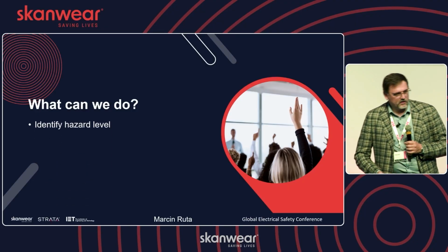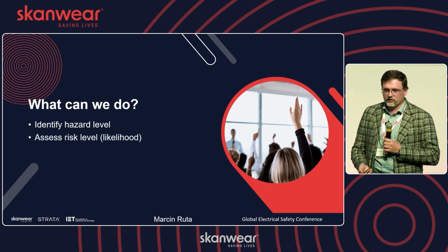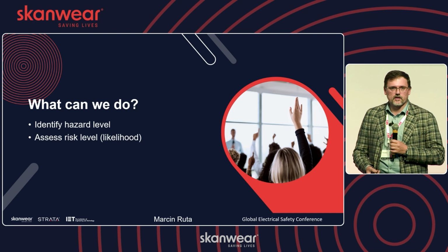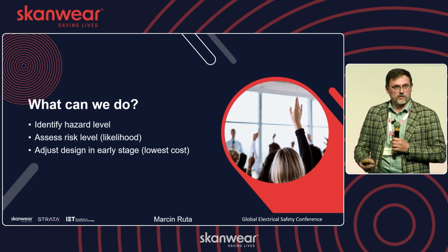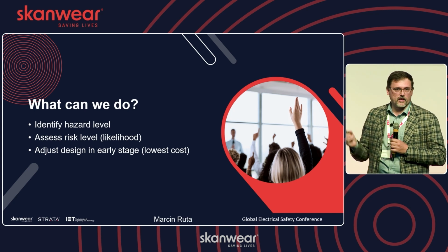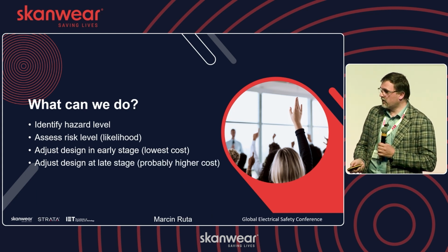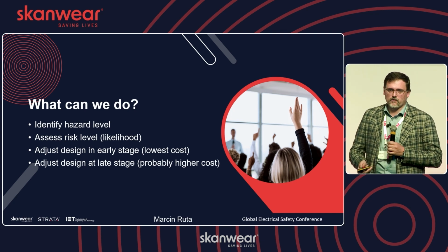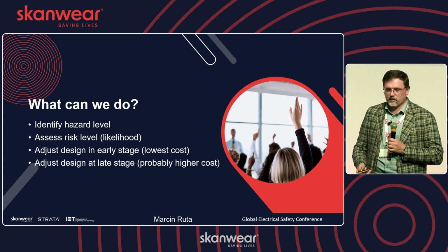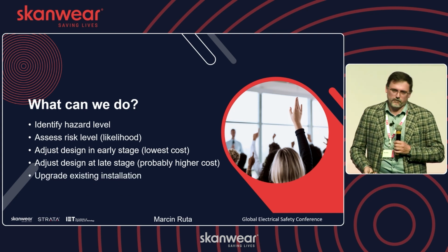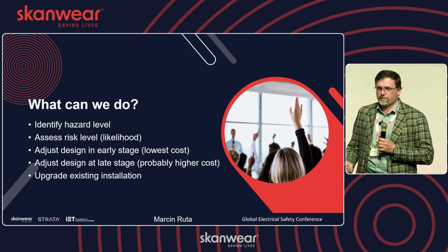We can identify the hazard, so that's the first thing. We can also look at the risk assessment to have a likelihood, so we can assess how likely it is to happen. We can, of course, adjust the design at an early stage, which is probably the cheapest thing you can do if you design anything. We can adjust it at a late stage, which is probably more expensive, a very painful process when you are working on a project, especially from my perspective. And because there's a lot of existing installation that we have to handle, we still have to work with this.